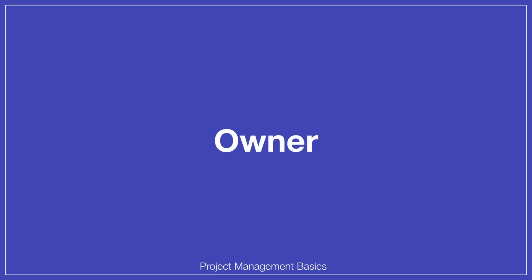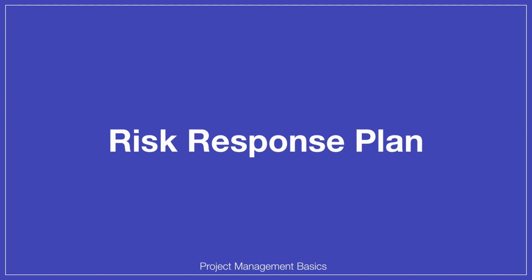Alright, every risk should have an owner, and this owner is not only you. You need to find someone who is more experienced, more knowledgeable in this area, who can tackle the risk better than you. Next, you need to write out the risk response plan, and here you put the actual steps that you will take to avoid or mitigate the risk. Likewise, if you want to actively or passively accept this risk, you write it down here and you mention the amount of risk reserves in money or time that you allocate for this risk.